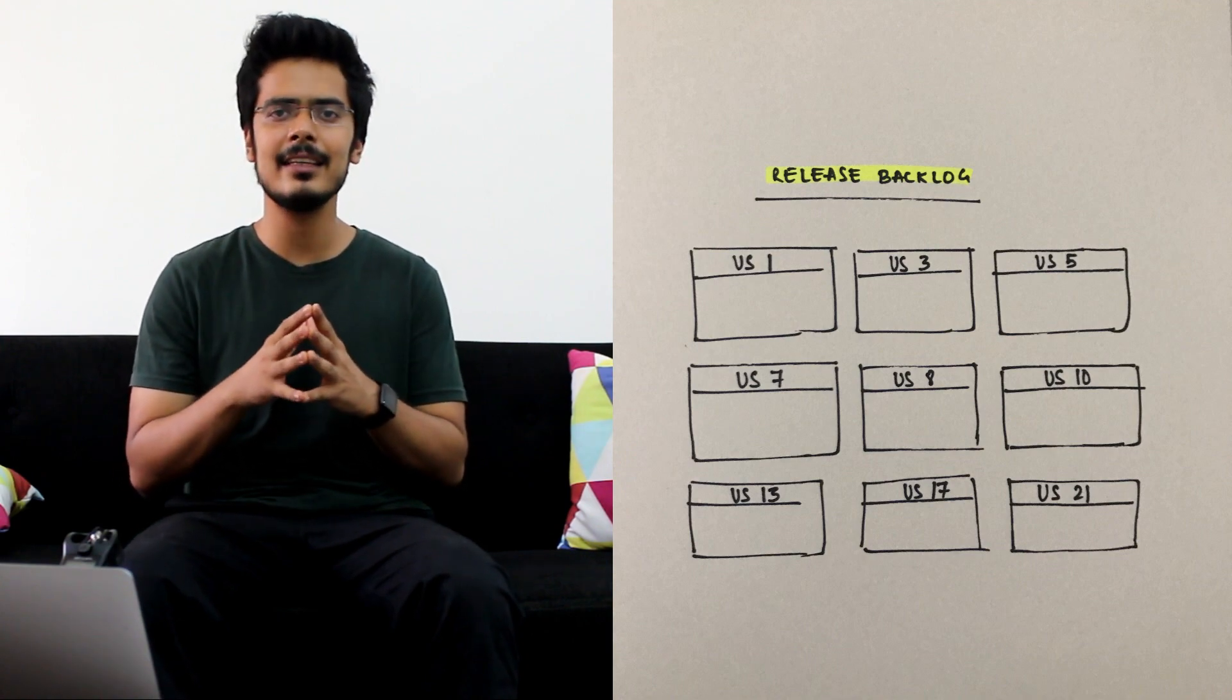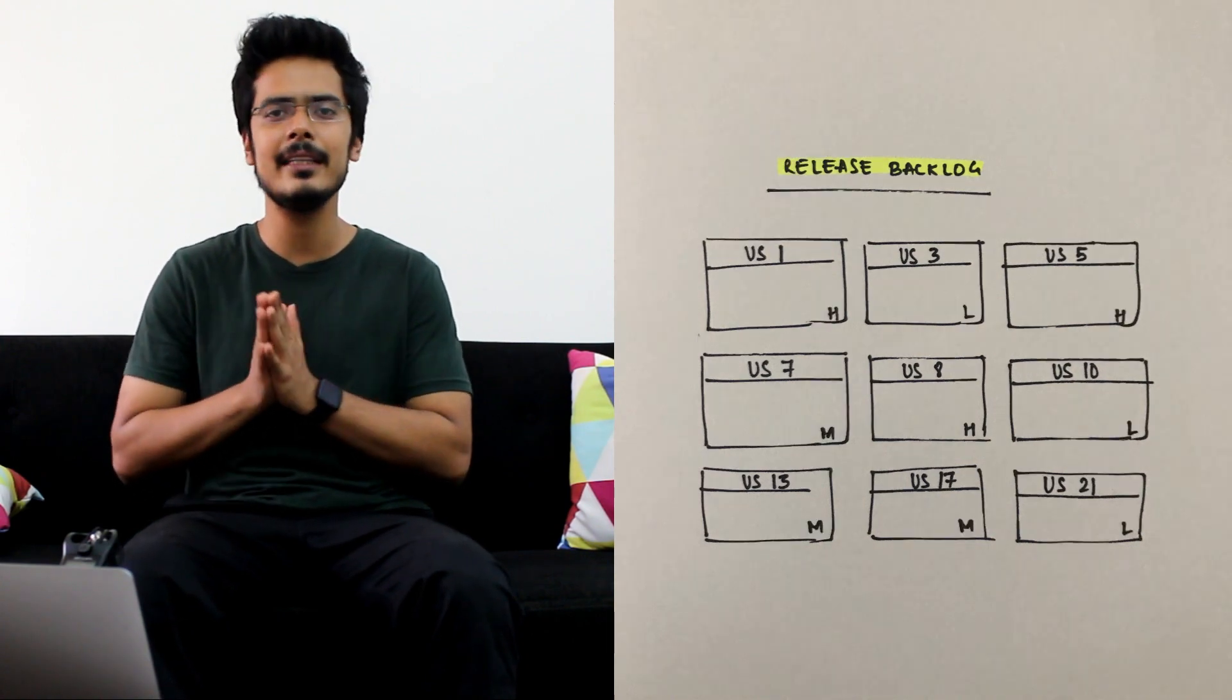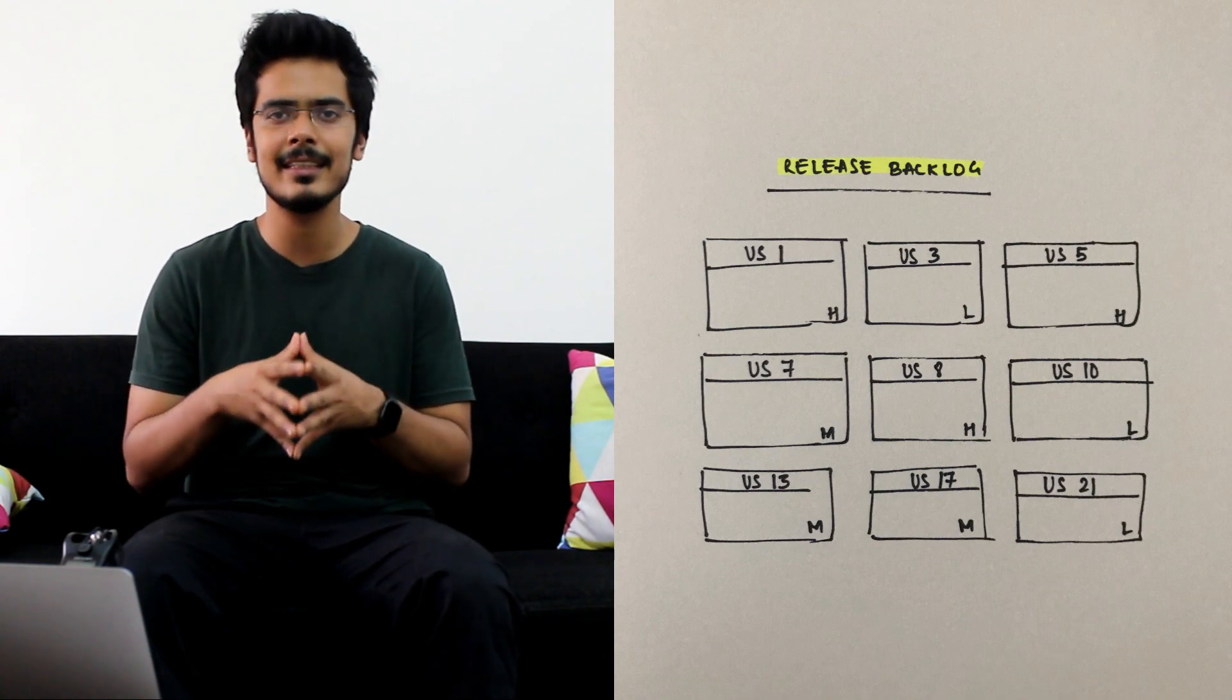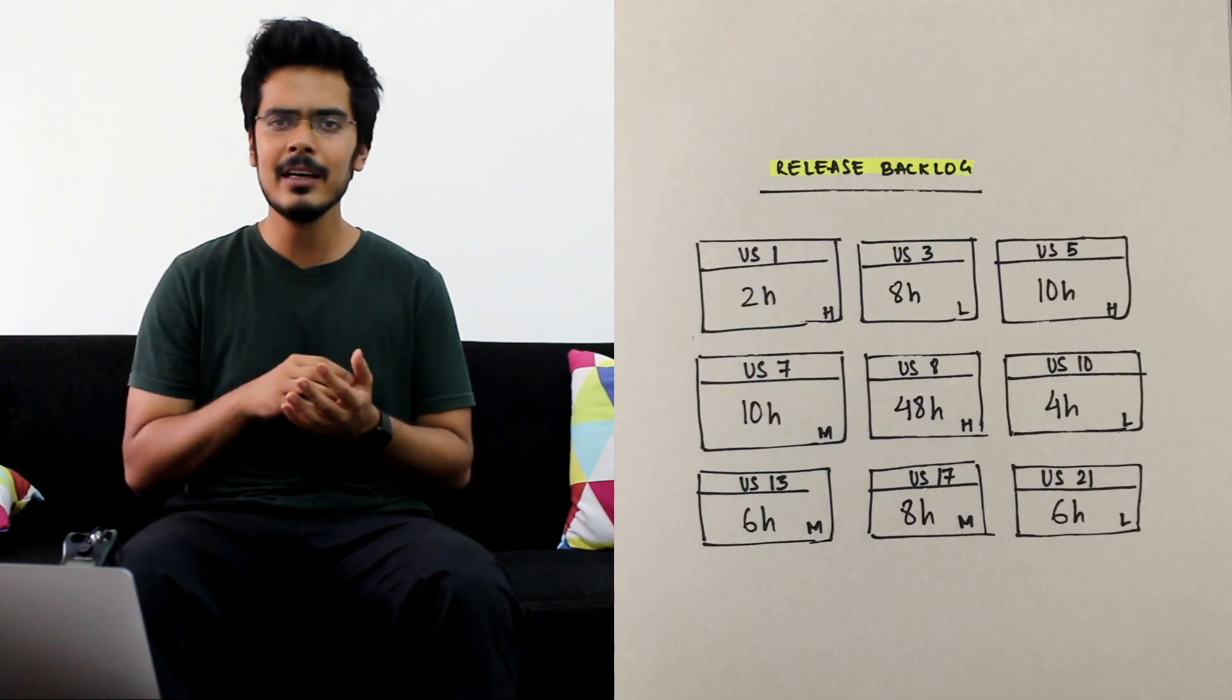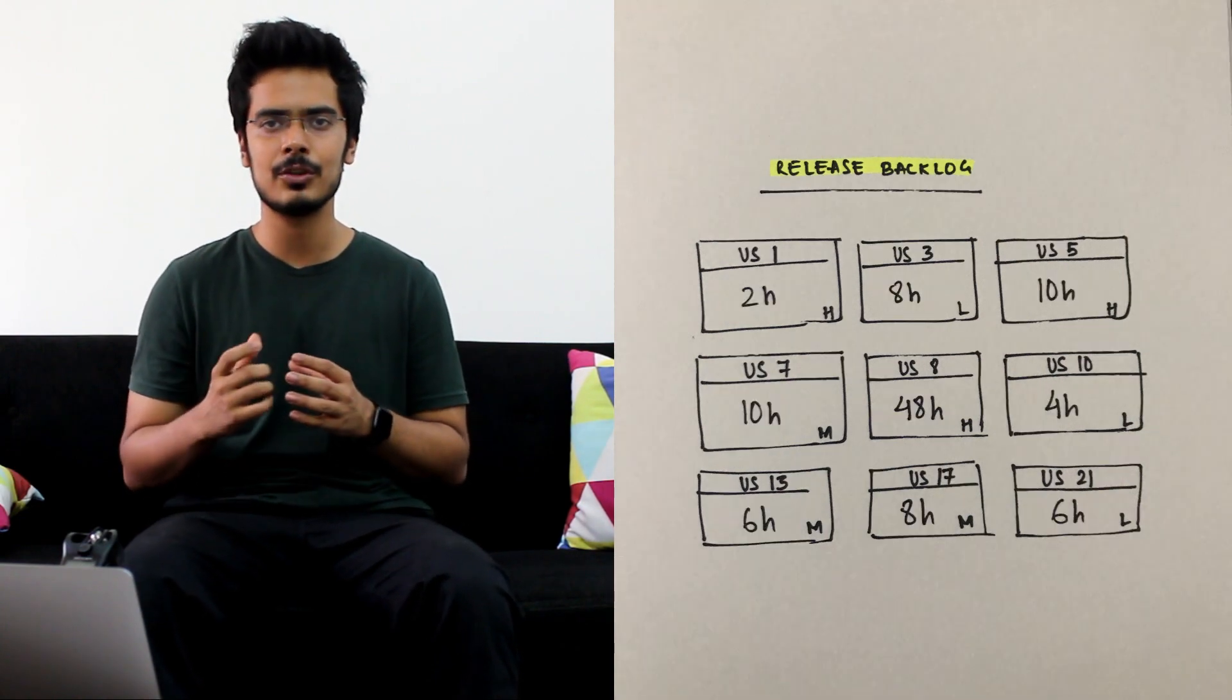From here they prioritize the list of user stories into high, medium and low. So basically the team gets an idea of what is of utmost importance in the next release cycle. From here the team starts adding time estimates to each of the user stories.